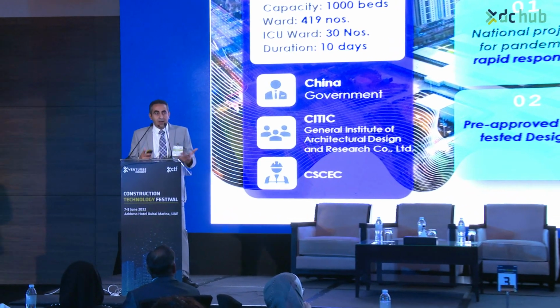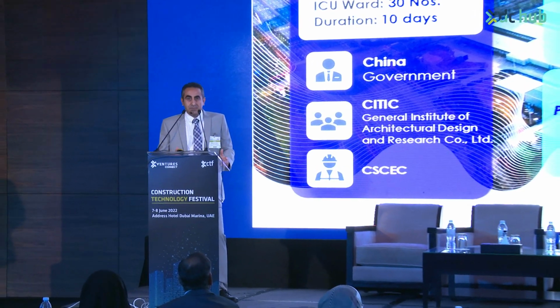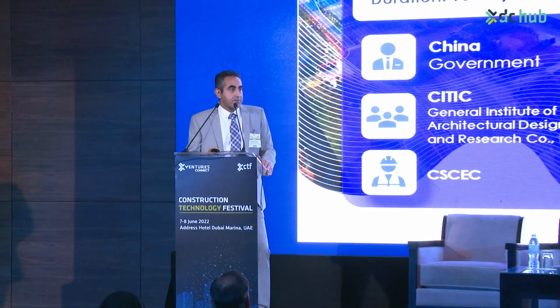It used a pre-approved design and a pre-approved system. There was a pre-approved plan for this project to be executed with such a quick response. And they used a reference case of another hospital which they built in Beijing at the SARS time in 2003, of course with alteration of design, but the pre-plan was already there. The third one, they used an off-the-shelf pre-approved system also. So the materials they decided to use were already available with many vendors and many supply chains.